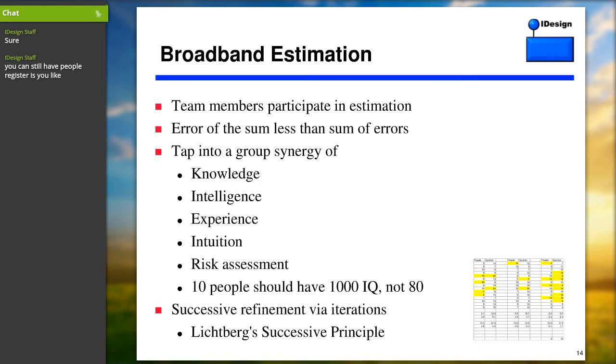What do you know that nobody else does? Well, maybe this whole thing is available with this SDK, you change the logo and it's done. Well, everybody said seven, you said 20. What do you know? Well, once you go to the cloud with the queues and the certificates, the whole thing is a mess. So you let the outliers voice the additional context, additional information. And then everybody gets to weigh in on that additional information, and you do it again.